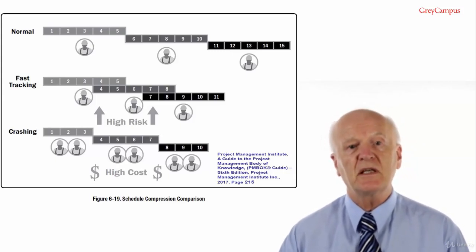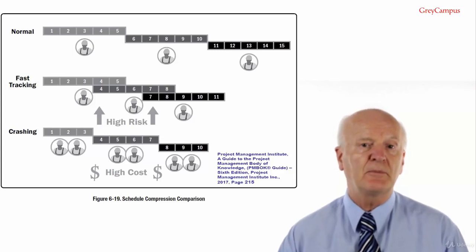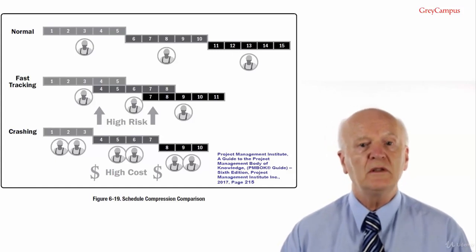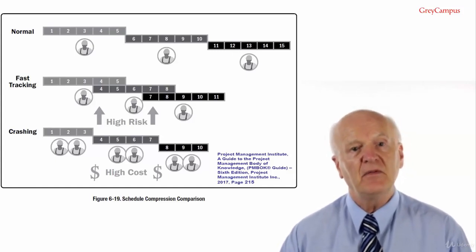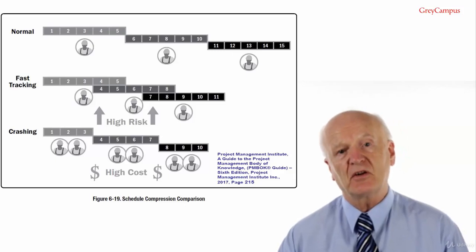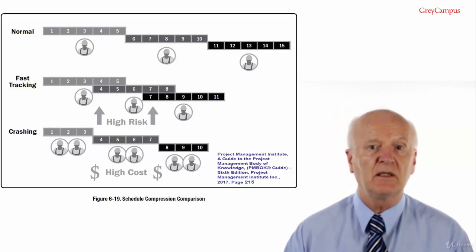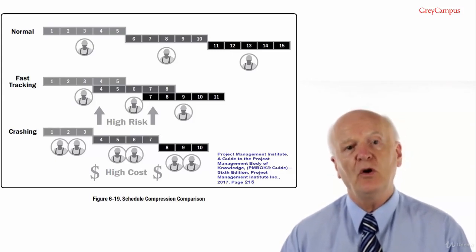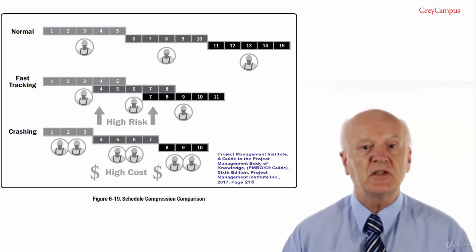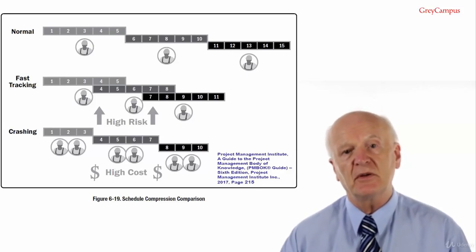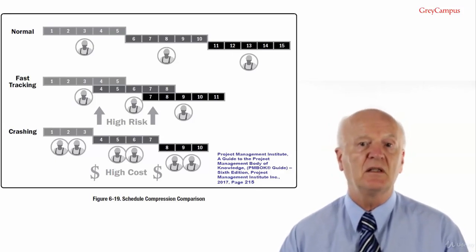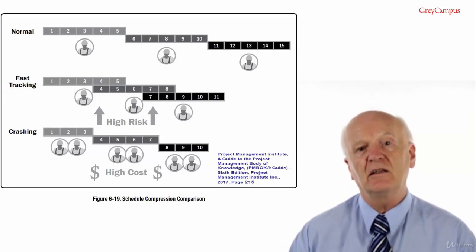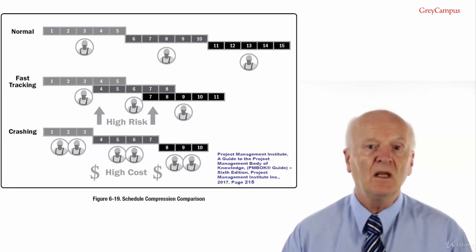To fast track the process, these activities can be overlapped. When the plasterer finishes the first wall, the tiler will start to tile the first wall as the plasterer starts working on wall 2, and so on. This means the tiling activity will have a lead of 12 hours over the plastering activity, and it reduces the theoretical time to 16 plus 4 hours equals 20 hours. But if the plasterer slows down or runs out of materials, the tiler must slow down or stop too.